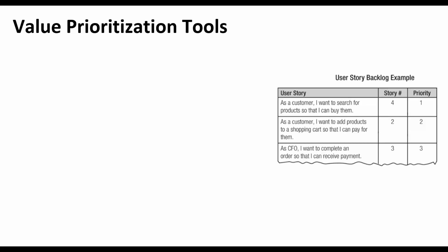So the way that it works is the team sits down with the customer to review the list of work and asks the customer, has anything changed? Do we still want to work on feature B right next, whatever the feature is?